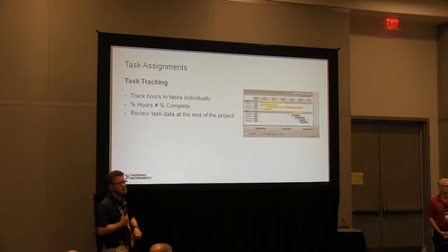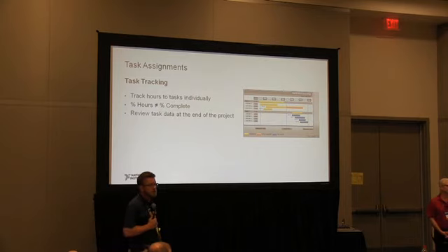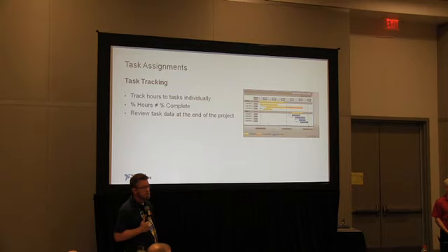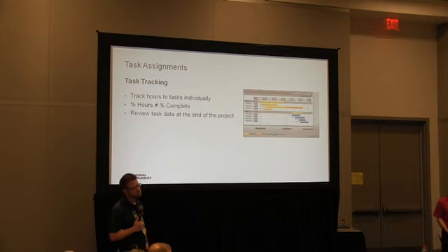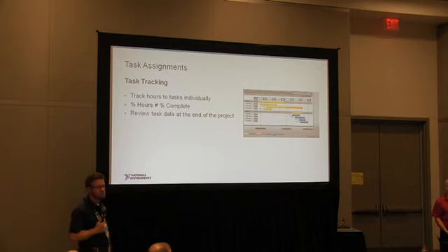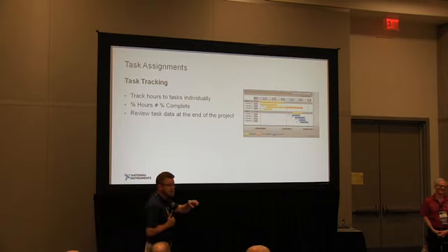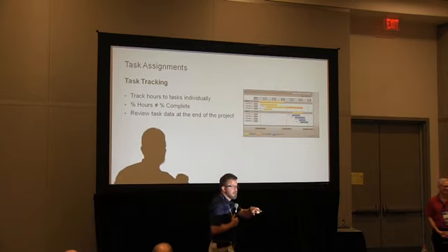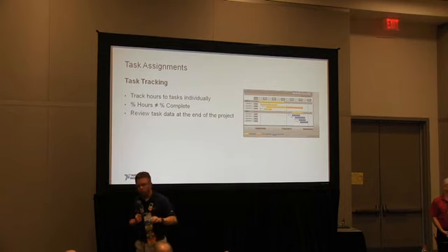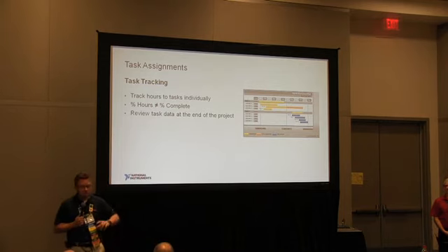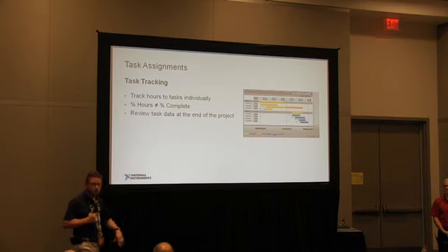Dovetailing on that, I've heard of one technique where you break it down so tiny that a task is either done or it's not. And it avoids this I'm 90% done thing. I mean, almost everything's always 90% done, right? With the other 90% yet to finish. Yeah. 10% of the work takes 90% of the time, right? Okay, so the comment was, if you break it down small enough, it's either done or it's not, right? And so you don't have this, well, I think I'm 90% done. It's either done or it's not.